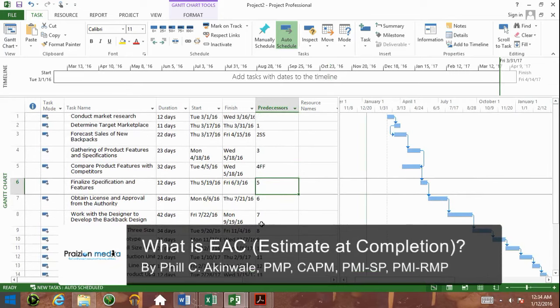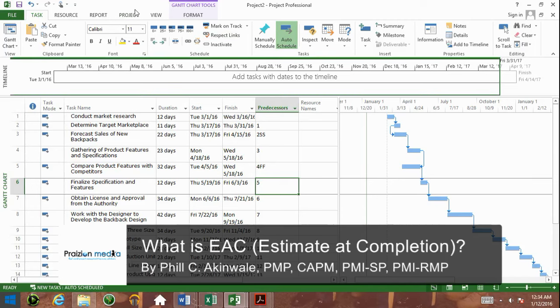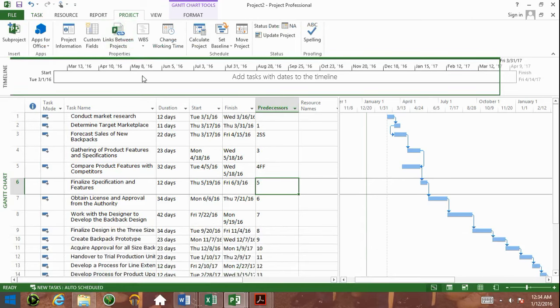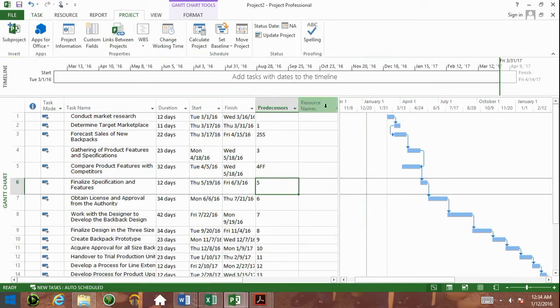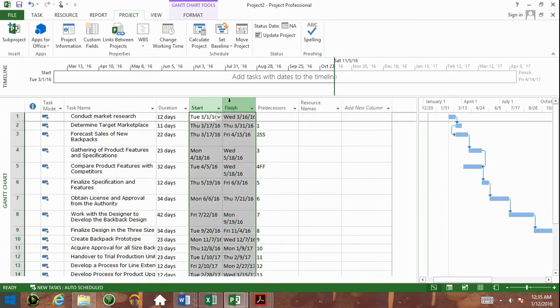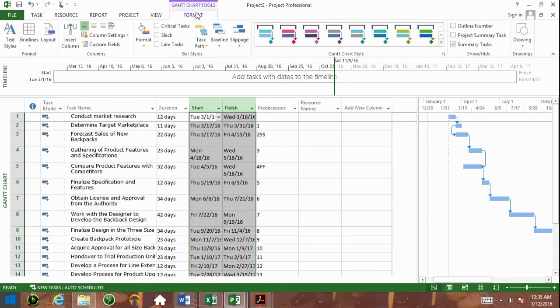However, there is one last thing we need to do. What we need to do is set a baseline for this project. And a baseline is going to help us have a snapshot in time of what exactly this project is about. We want to make sure that if we look at this project 5 months later, when these fields change, because they will on most projects, we have a baseline that we can measure the project against.